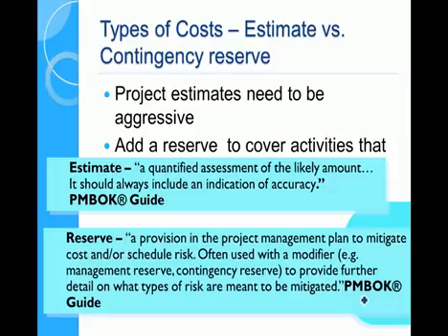Not that we're doing procurement in this series of lectures, but other types of contracts, what we call fixed cost contracts, actually the project manager or the project team take on the risk. And in fact, what they do is they have a 20% float or profit margin, and that contingency is used from that profit margin. So the more the contingency is used, the less the profit margin. So where cost estimates are wrong or where risks occur bites into the project delivery organisation, which is why it's really important, we come to this in 6C, that protecting the reserve is most successful when we have tight cost controls on our project.